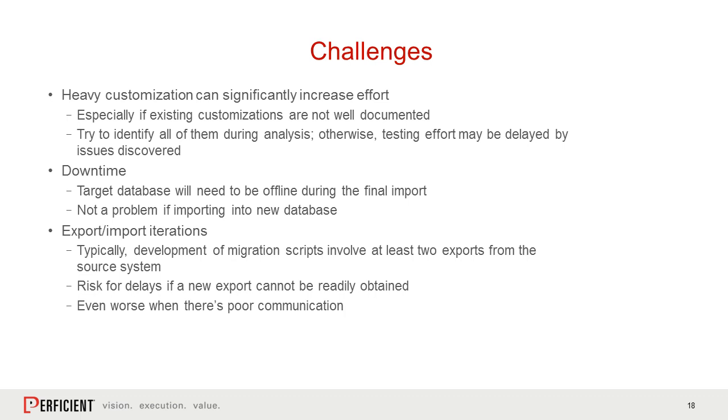We've had situations where the previous vendor might not have 100% of an idea of what all had been done, and you kind of need to go through this process of almost reverse engineering a bit and determining what the dependencies are, and are those dependencies actually customizations that need to be migrated along with the data. And you want to do this upfront. You want to do this during the beginning.